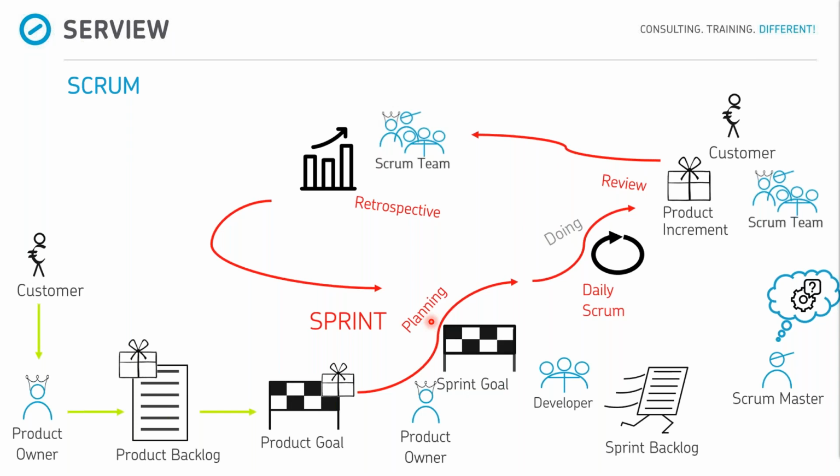The pros of Scrum are, for example, that through the fixed time boxes, you can work more focused and be more efficient. For example, in the sprint planning, we only have 8 hours for a 4-week sprint to plan the sprint. The daily Scrum is time boxed to 15 minutes to be very concentrated and focused to give a short update, for example. And it's more efficient. We don't lose time.